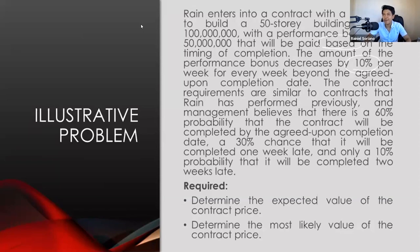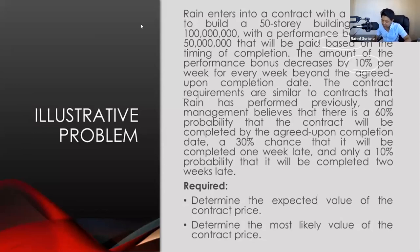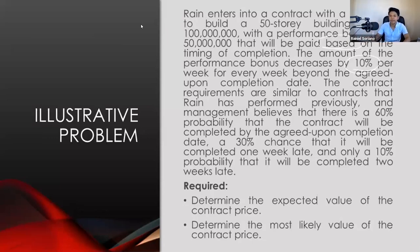The amount of the performance bonus decreases by 10% per week for every week beyond the agreed-upon completion date. According to the problem, there is a 60% probability the contract will be completed by the agreed-upon completion date, a 30% chance it will be completed one week late, and only a 10% probability it will be completed two weeks late. Requirements are the same: expected value and most likely amount.